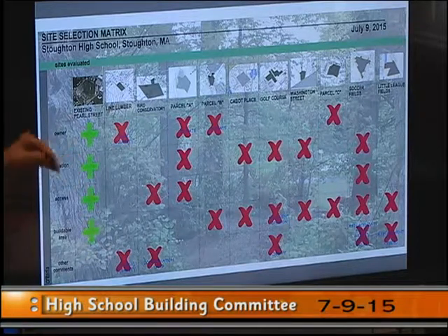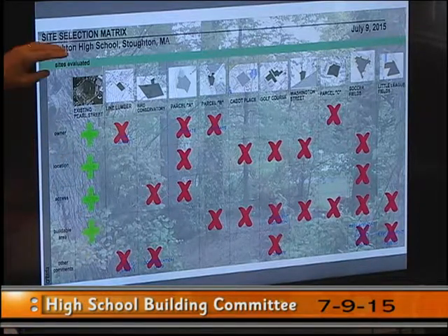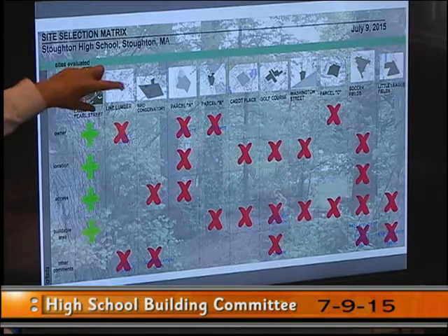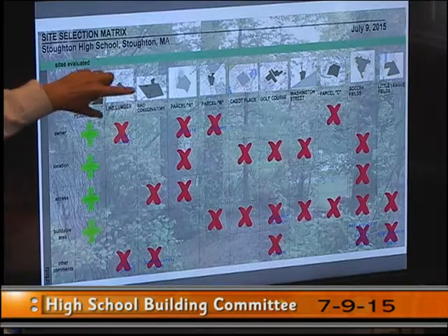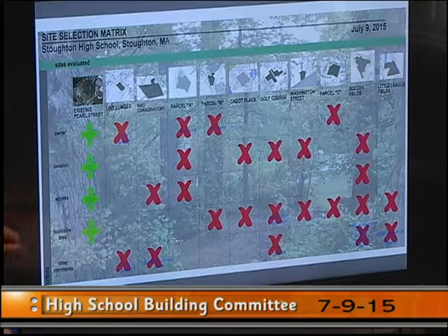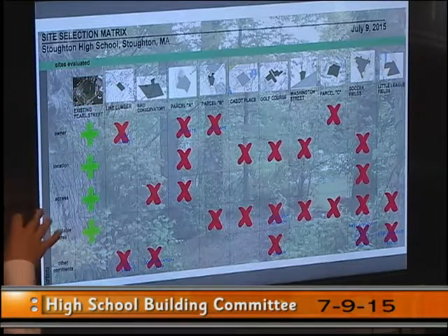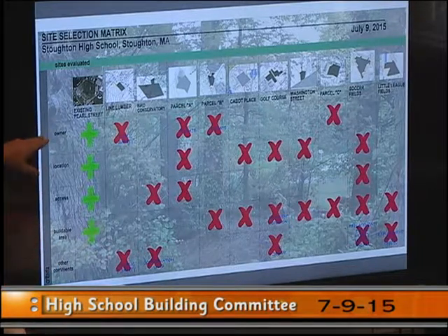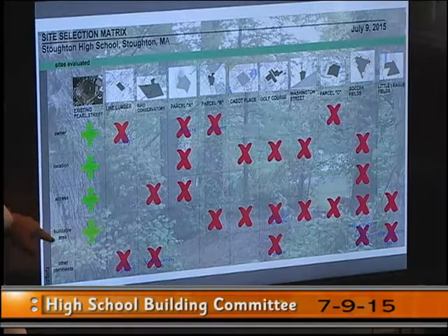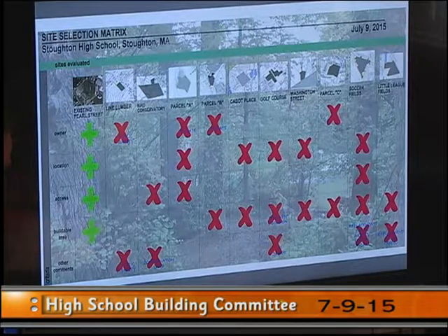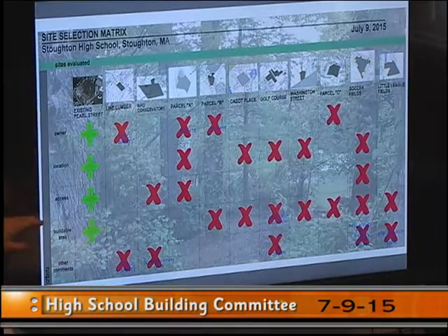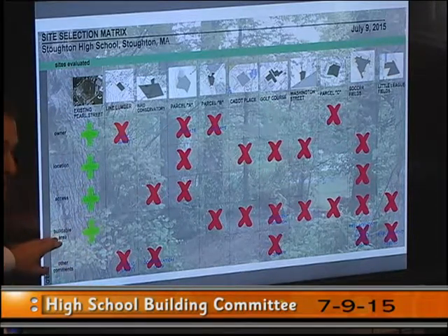took the 10 properties that we were looking at, Line Lumber, Bird Street, Parcel A, Parcel B, Cabot Place Golf Course, Washington Street, Parcel C, soccer fields, Little League fields, and identified here the primary deficits with these, whether it's ownership, location, access, or buildable area. There were very few pros to them, and the most significant thing was the buildable area.